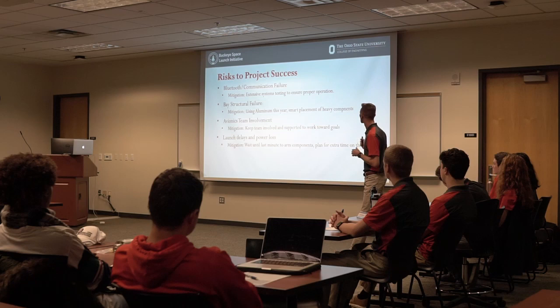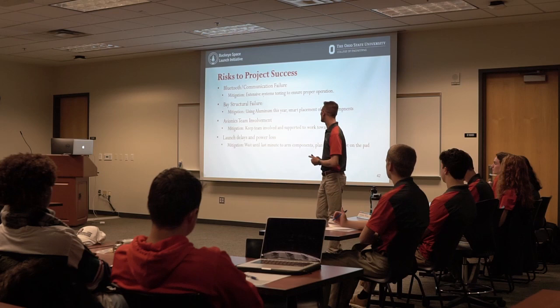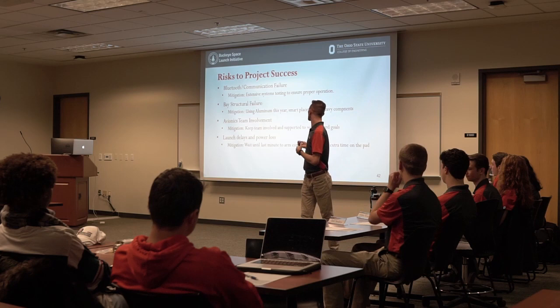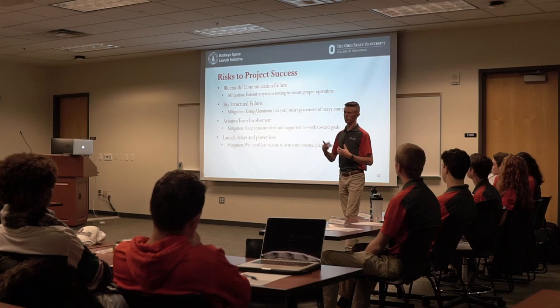So some of the risks to our project success. Obviously, Bluetooth and communication failure would be really bad, because the risk with putting everything on one communication bus is that if that bus fails, then nothing works. But most of the systems that we'd be arming, we would not launch without them working anyway, so that's something we would have to address anyway. But mitigation is just doing extensive systems testing to ensure proper operation, and trying to use more robust connections, like using the PCBs, rather than just direct wires, to improve those kinds of issues.